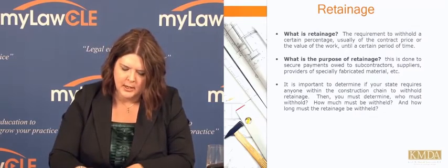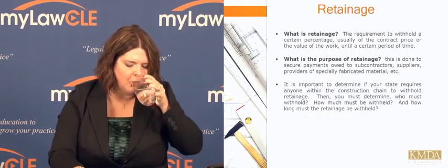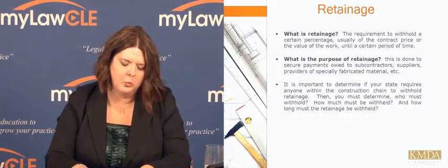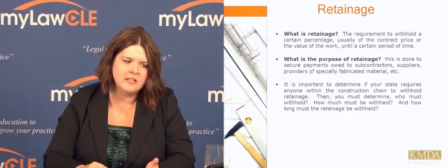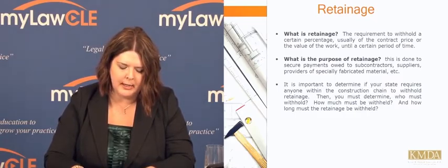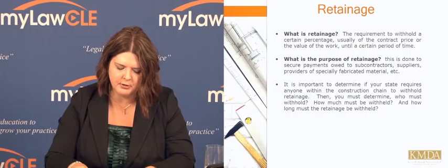What is retainage? The requirement to withhold a certain percentage, usually of the contract price or the value of the work, until a certain period of time. So I'm not sure how many of you know what retainage is, but in Texas, retainage is very, very big, and it's very popular, and we have to know a lot about it. The purpose of retainage is to secure payments owed by subcontractors, suppliers, providers of specially fabricated materials.